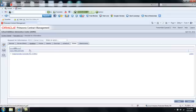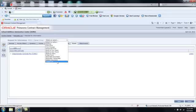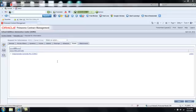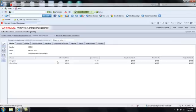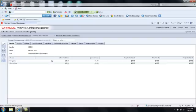While I'm on the RFI, I can actually initiate change management. If I go to select an action and select Initiate CM, a change management document will then be created and displayed. So here I am now in change management, and you'll notice on the General tab that the document has the same ID or same description as the RFI.